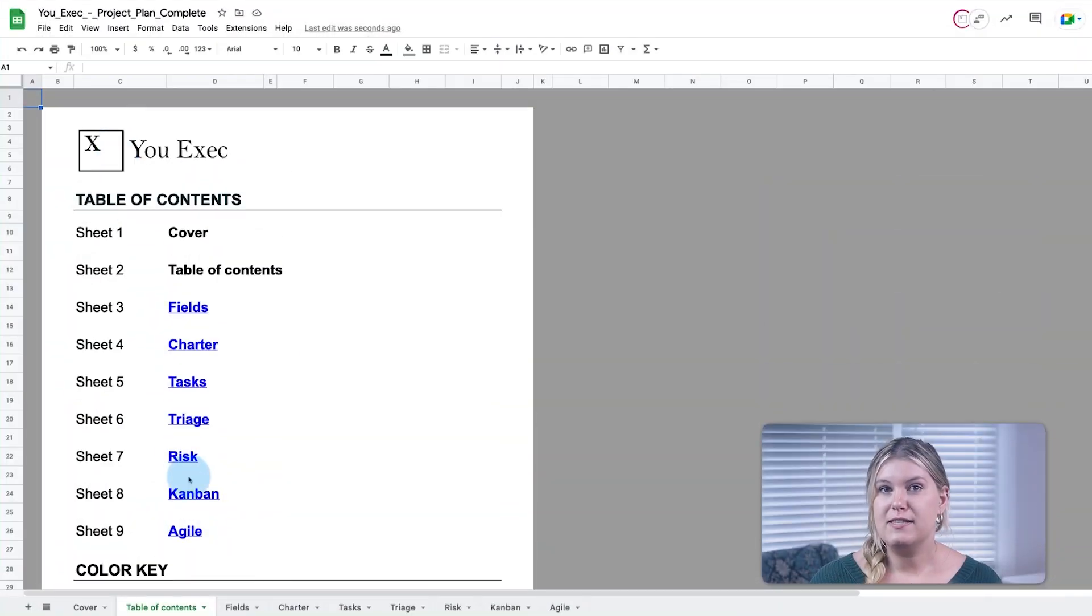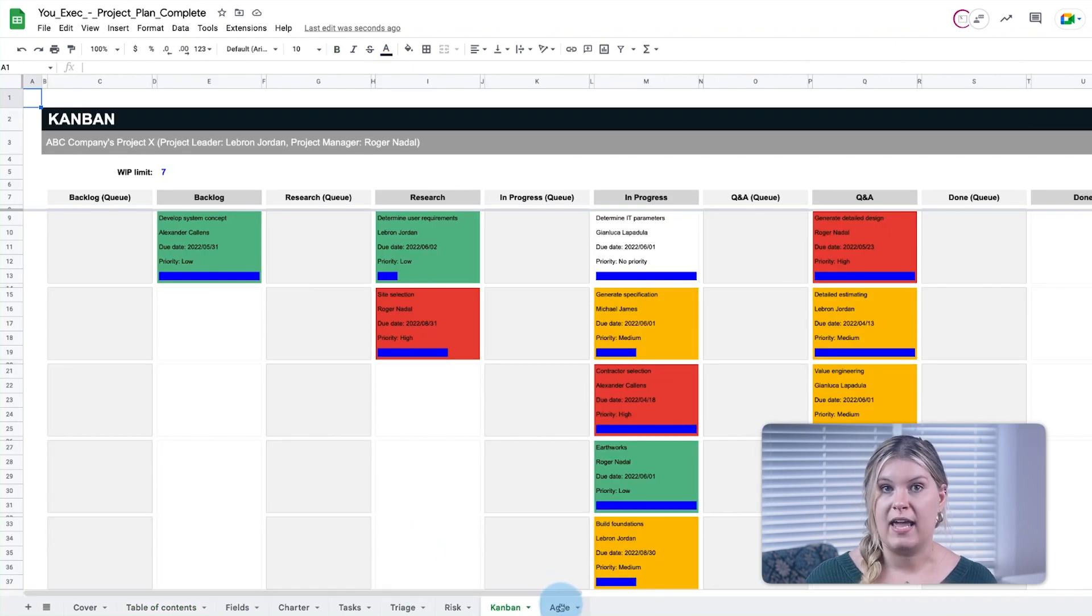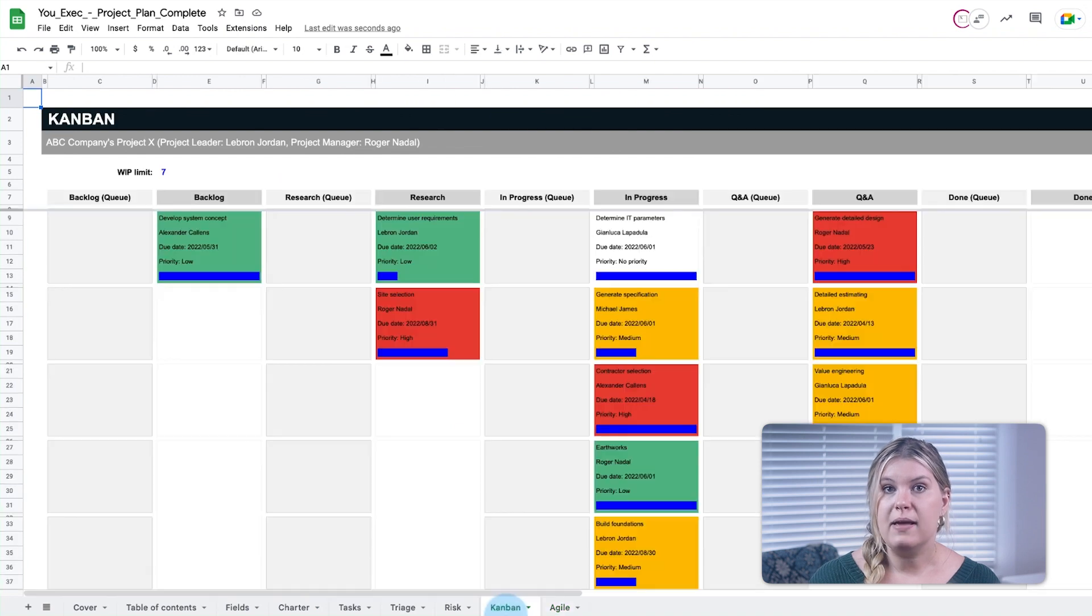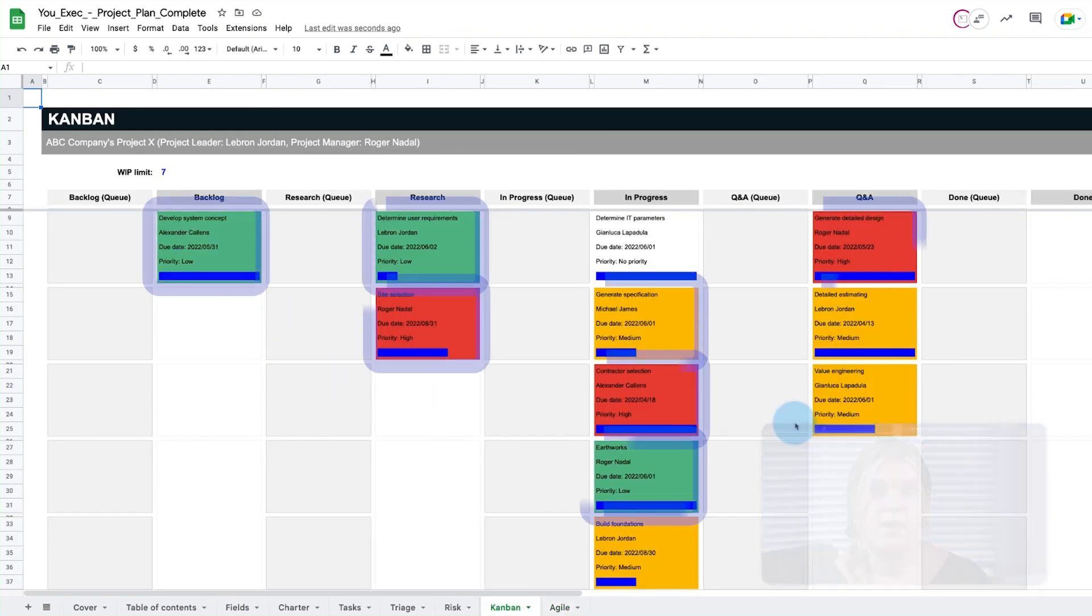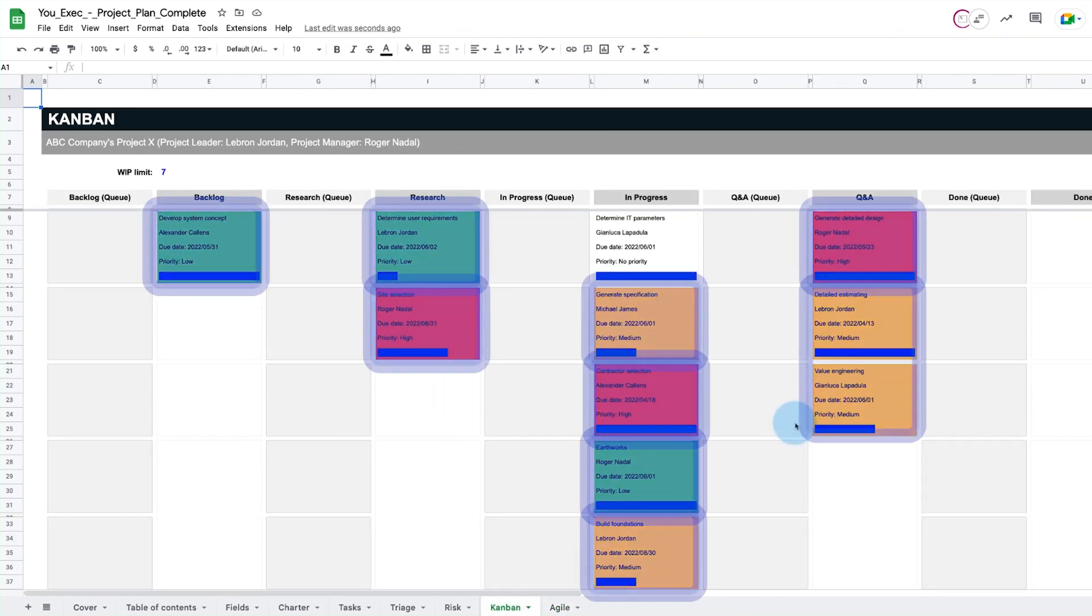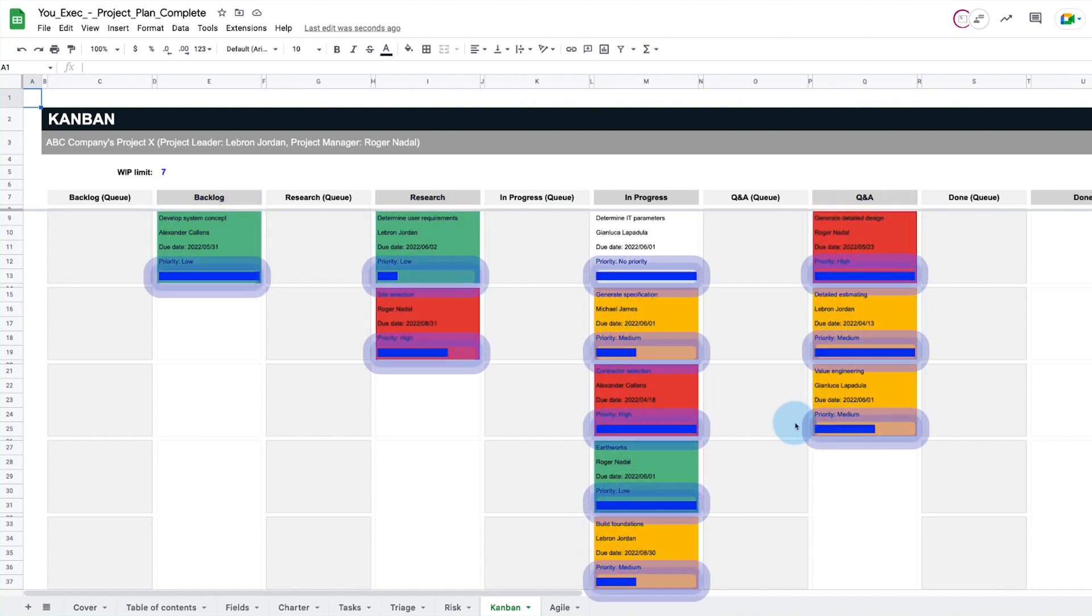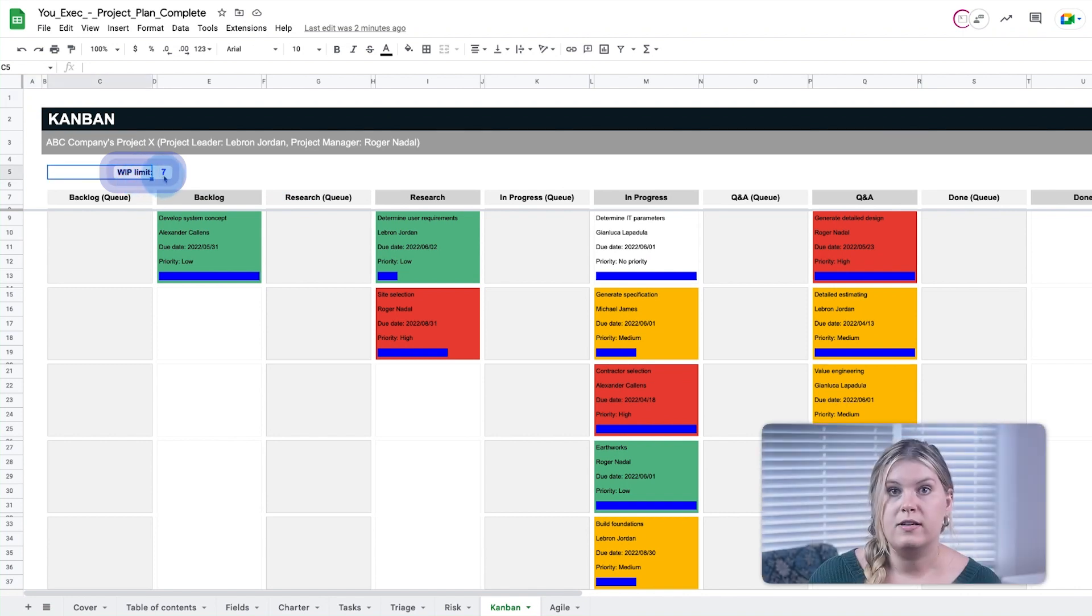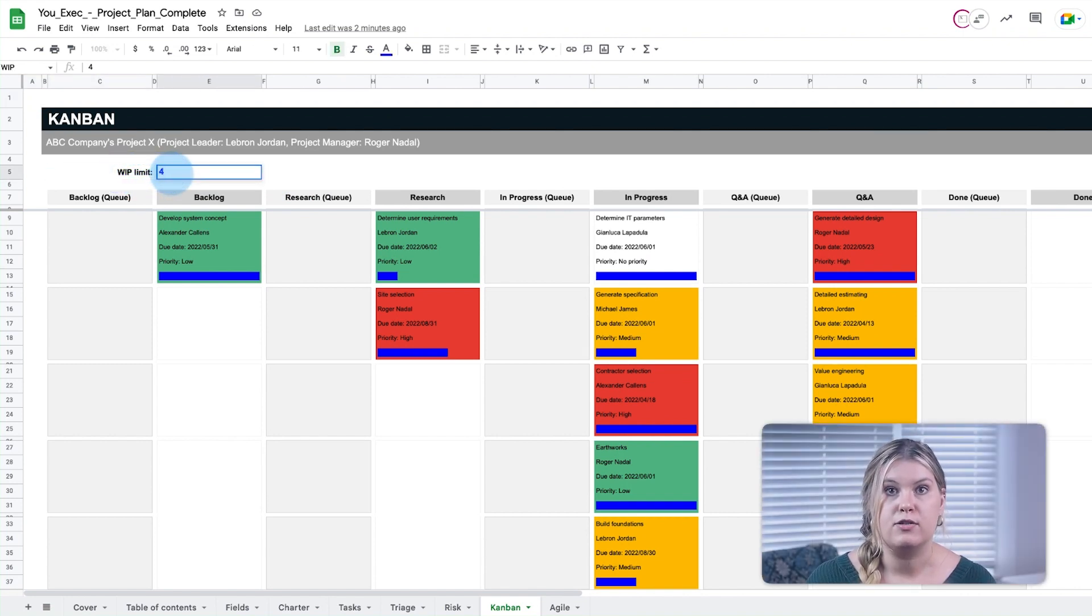To visualize the project management timeline in real time, we've provided both Kanban and Agile views. The Kanban board uses a stage system that color codes cards based on their priority level and includes a progress bar that shows how far along each task is. A work in progress limit at the top prohibits any particular stage from getting too overloaded.